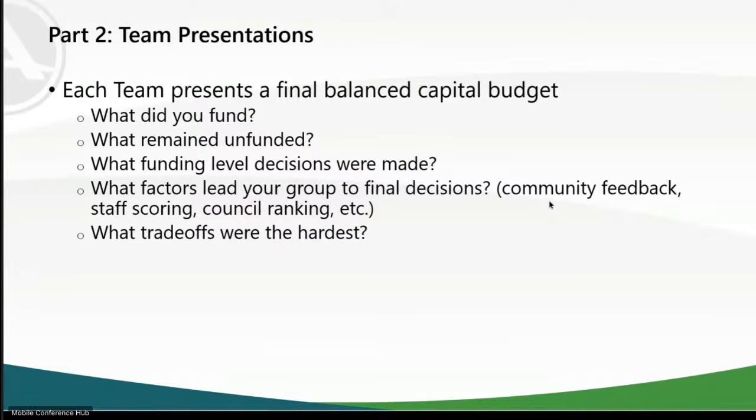And then on the facilities, you're prioritizing some of the space considerations that the staff outlined yesterday, but also looking at sequencing of things, right? In order to do anything with the downtown fire station, we need to complete fire station number 3 first, right? So keeping some of the order of priority in mind.